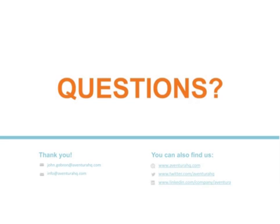But also, if you introduce something new, those underlying issues get a bright light focused on them, and sometimes that bright light can be misconstrued as an issue with the new application, where it was really underlying issues that weren't really present because something new hadn't happened in that environment and they were used to living with it. So my suggestion with any application is to know your environment, know your infrastructure, and make sure that your systems are optimized before you introduce something new. That'll help with the implementation of that application, and it'll keep the clinicians from thinking that something went wrong because we introduced something new, when really, if you dug deep, it was something that was already present. So it's just optimize before you implement.